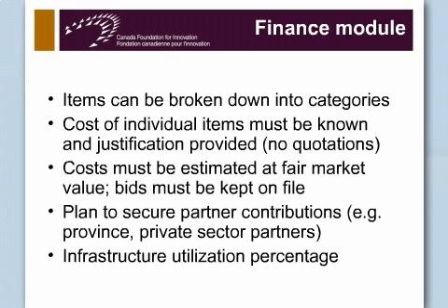As for items, normally something less than 10%, perhaps 5%, is what we see regularly. I'm sure my colleagues Sylvie and Anne can confirm that on regular items, 5% is what we normally expect.